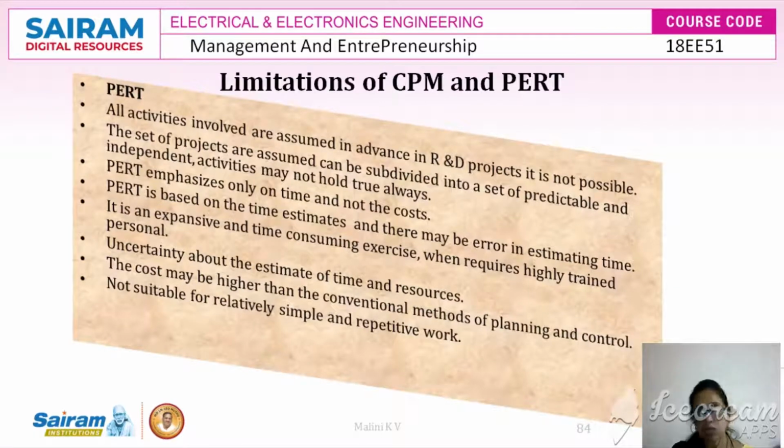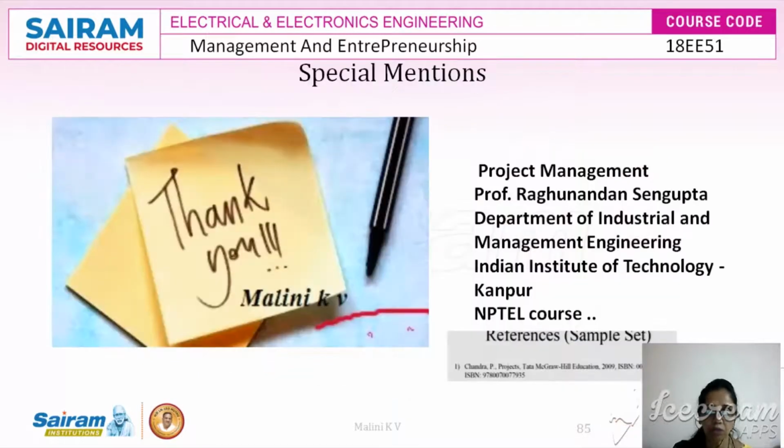PERT is also based on time estimates, and there may be error in estimating the time, and it can be an expensive and time consuming exercise. It requires highly trained professionals in order to develop the PERT diagram, and there is uncertainty about the estimation of the time and the resources. Cost may be really higher than the conventional methods of planning and controlling. It is not suitable for relatively simple and repetitive work, but it is definitely suitable for complex work.